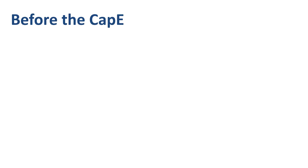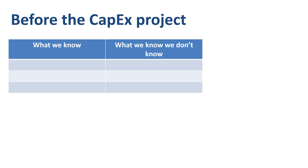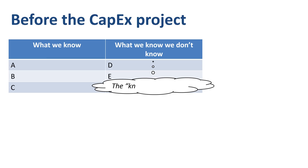When you try to manage risk and uncertainty around a CAPEX project, you should be able to list items in two categories prior to making the investment: the category called 'What we know,' and the category called 'What we know we don't know' — the latter also called the known unknowns.